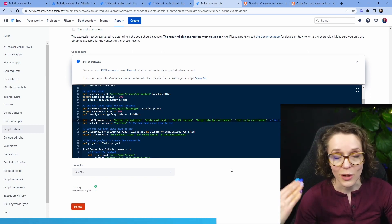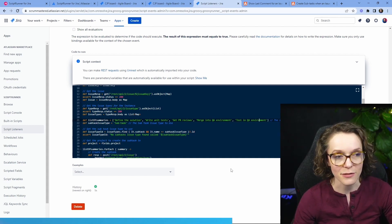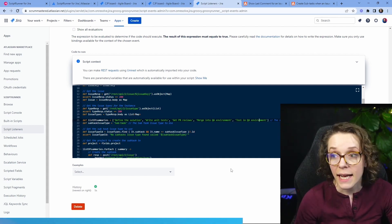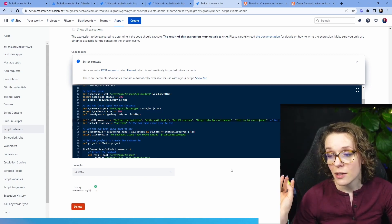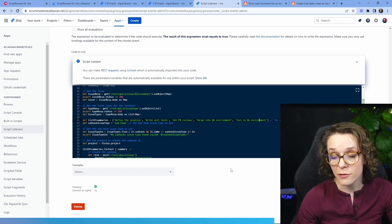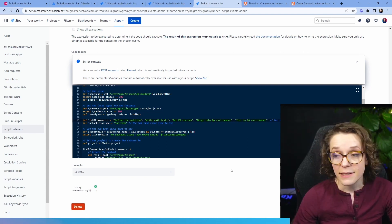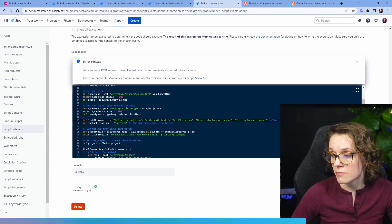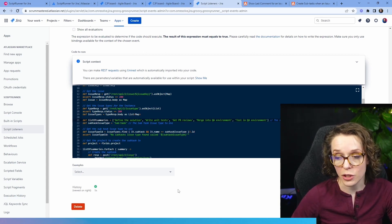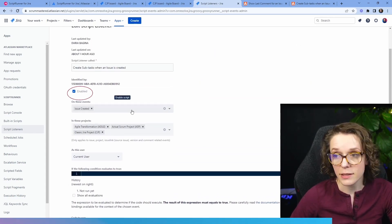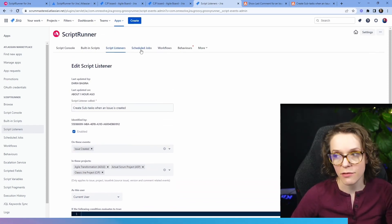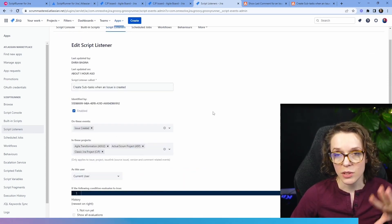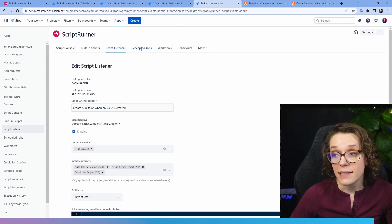With this it actually removes that tedious part of creating subtasks that you need to do manually for every subtask and instead just sets them up for you and usually your team will always go through kind of the same set of subtasks or the same set of things you need to do for every ticket especially for things like definition of done right you can actually use it as a definition of done for yourself to double check that everything has been completed and that's automated you don't need to do anything you just save and whenever a new issue is created just making sure that it is enabled you have new subtasks created so it's a very good use case.